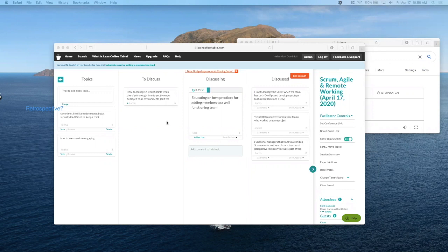I wonder if there's any appetite to convince the management layer to get through, probably 3 or 4 sprints, assuming they're 2 weeks each, just to collect data of how much work the current team can actually get done, because you need some kind of metrics to be able to justify, no, we don't need, or yes, we do need more of this type of resource or this type of resource.